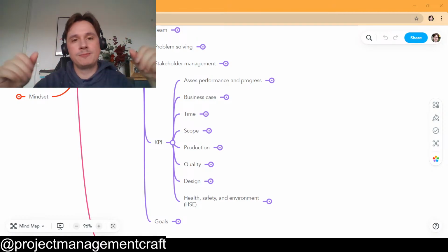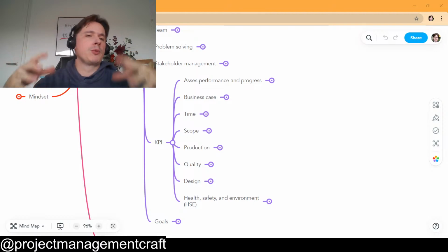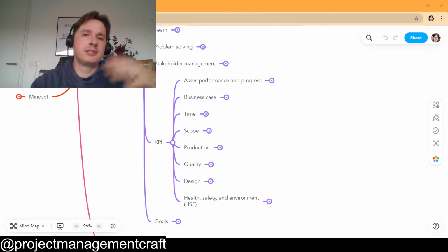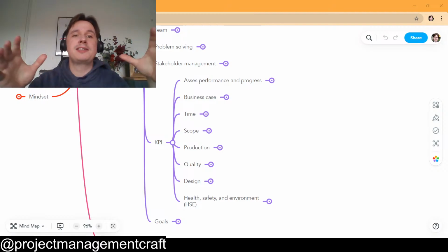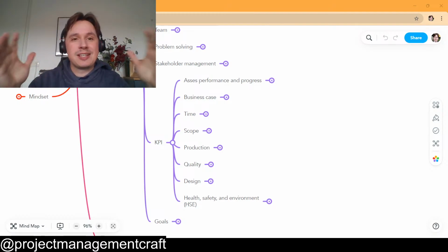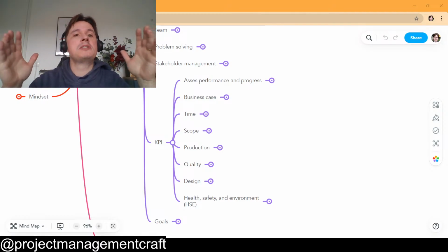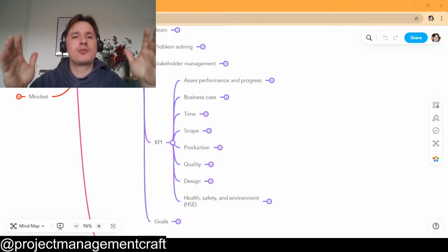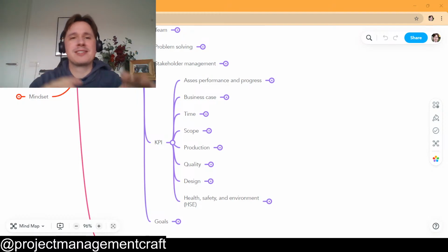The procurement team received a lot of complaints that they were delaying things. What they did was set a standard lead time to buy anything of 3 months, because then they were 100% sure they would reach it. So they wanted to measure their performance against this goal. What's the problem with this goal?